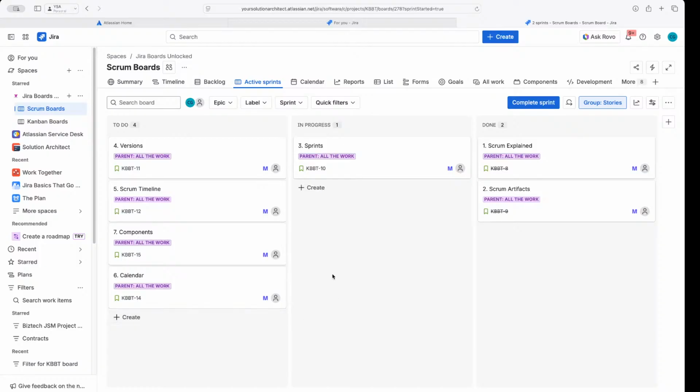So when you're net new and you create a project with a Scrum board, you might have a lot of tickets, but you hit create and they're not showing on this Kanban style board. It's because you don't have any sprints started or turned on, and you don't have any tickets in that started sprint. So if it is empty, that is why. So that is how you create a sprint and manage the sprint itself and the sprint planning.